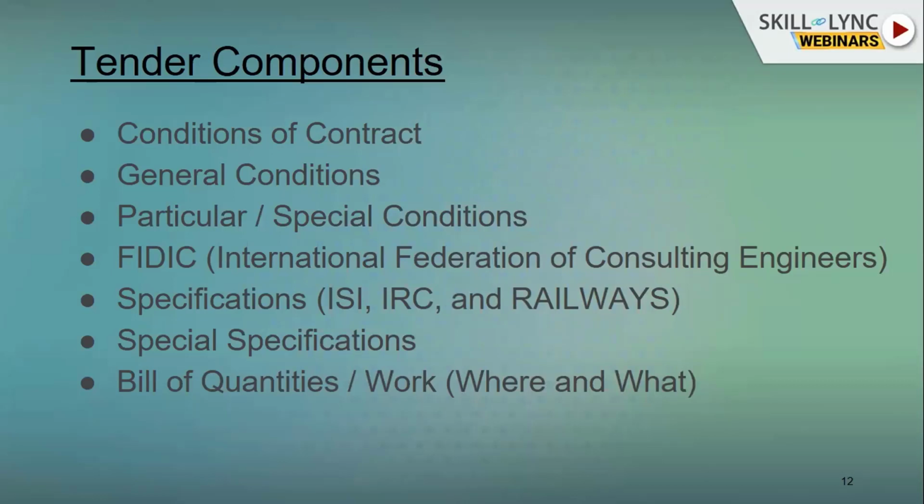Any deviations in the quantities may lead to extra cost for the project, so the quantities should have a detailed calculation so that someone can check them, or an executor will check those quantities, and he will question the contractor as to why the quantities have increased.